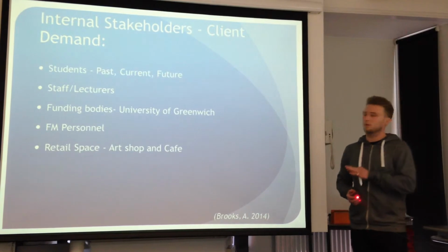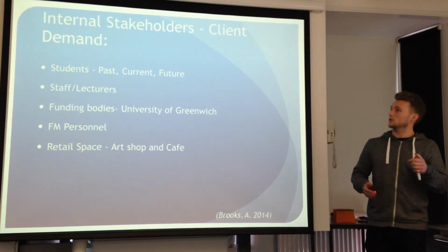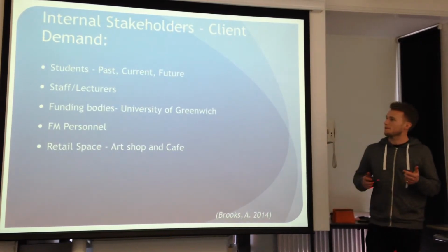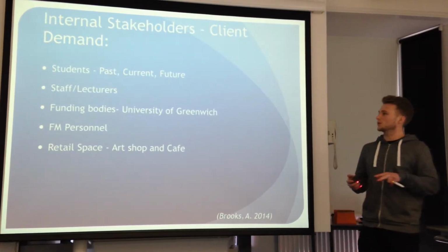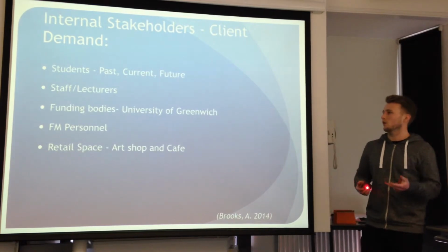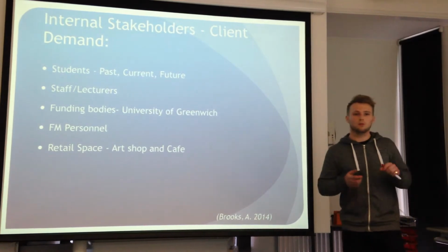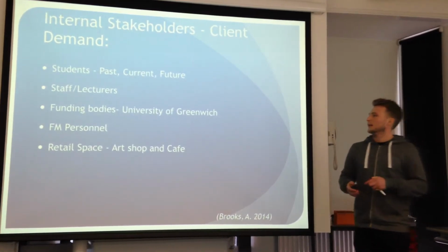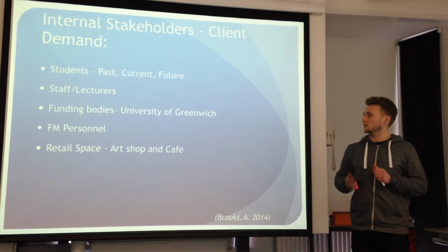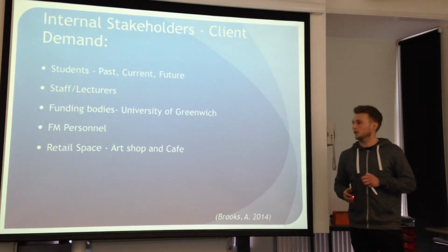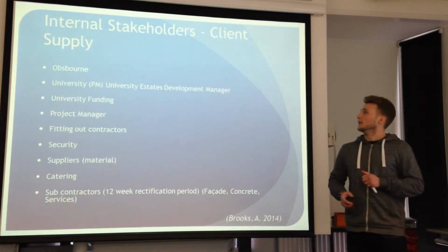So just to give you an idea in relation to this project for Stockwell Street of some of the stakeholders that could be involved in these categories. So internal stakeholders, client demand, so we've got students, staff and lecturers. Staff and lecturers split into two groups, both with different needs. Staff more administrative and lecturers more interested in space management. Then you have the funding bodies, University of Greenwich, of course, facilities management personnel, and finally, last example is retail space, which would be the art shop and cafe.